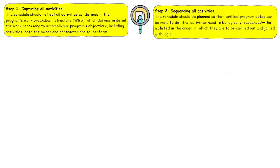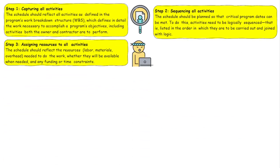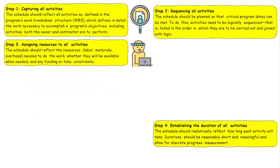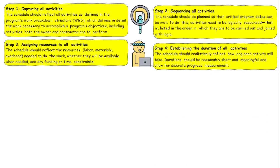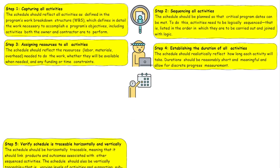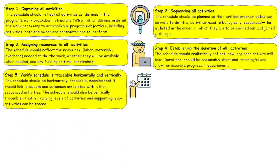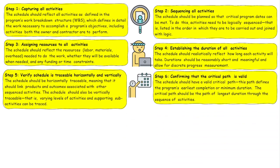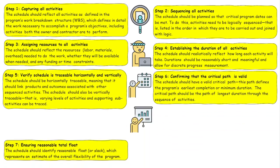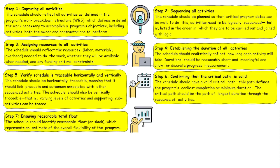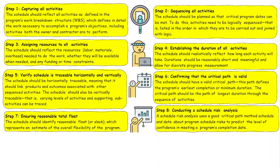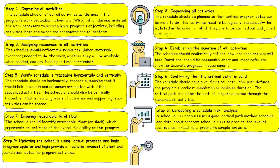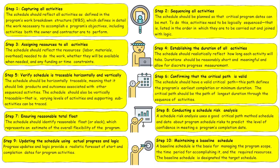The first step: capture all activities. The second step: sequence all activities. The third step: assign resources to all activities. The fourth step: establish the duration of all activities. Number five: verify the schedule is traceable horizontally and vertically. Number six: confirm that the critical path is valid. Number seven: ensure reasonable total flow. Number eight: conduct a schedule risk analysis. Number nine: update the schedule using actual progress and logic. And number ten: maintain a baseline schedule.